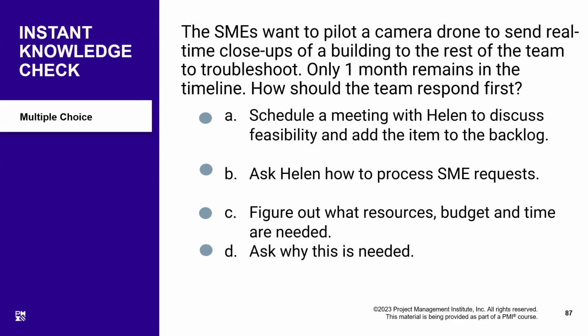Yes, because this is a valid change request, and we will treat it as such. So we will look at what the impact of this change request is going to be on resources, budget, time, etc. The decision whether to approve this change request or not is with the project board. So as a project team, we have no right to deny a request for change.